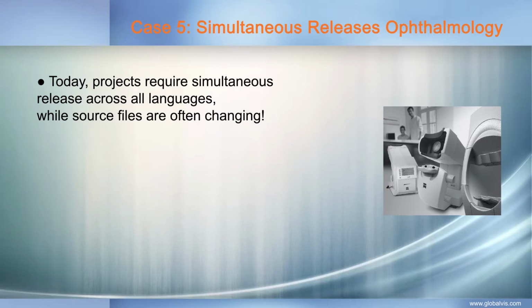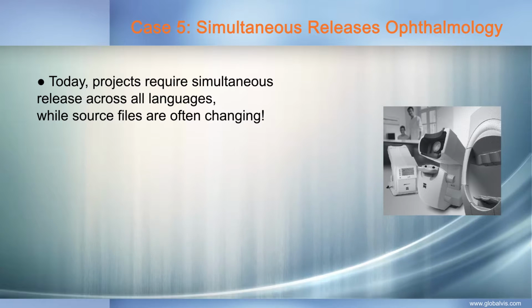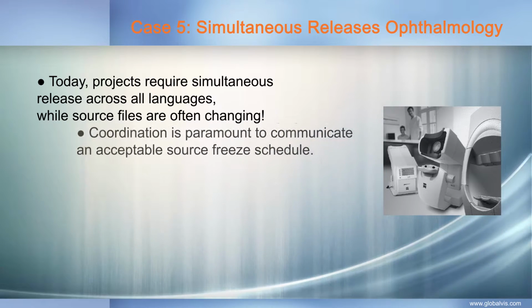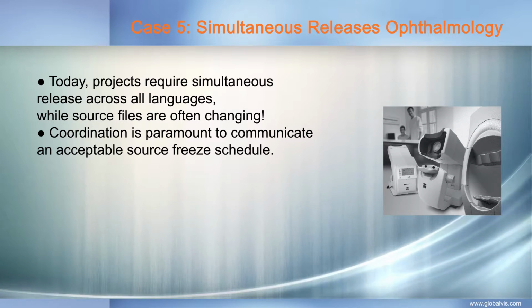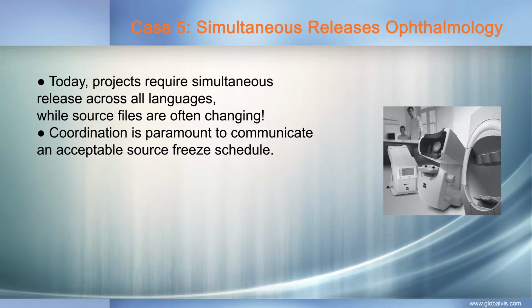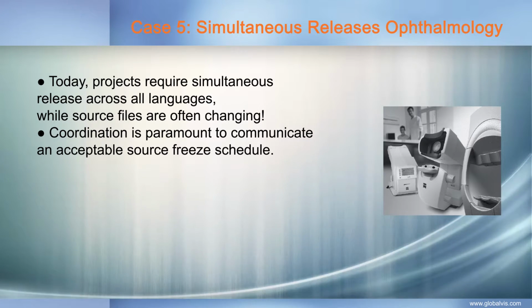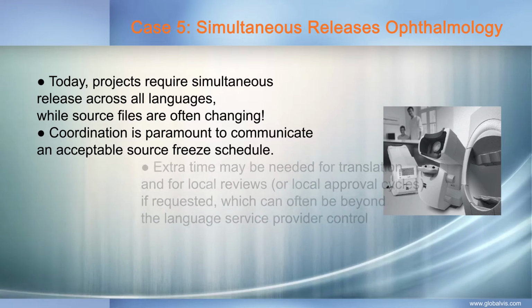Unfortunately, changes to the source language can still be requested until the last minute of the release cycle. Strong coordination between Global Vision and the client was necessary. The communication of solid freeze time or drop-dead dates indicating when updates to the source files would impact the release date is an essential part of the service we bring.